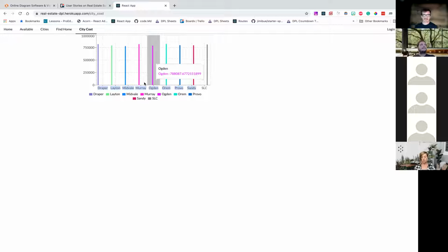Obviously, if I'm like, yeah, this is going to take me a month, then they're going to be like, why? So I don't have a number, but think about how long it will take and then maybe add, I don't know, 10, 20%. Sure, because it's always better to guess high and then pleasantly surprise people than take forever.